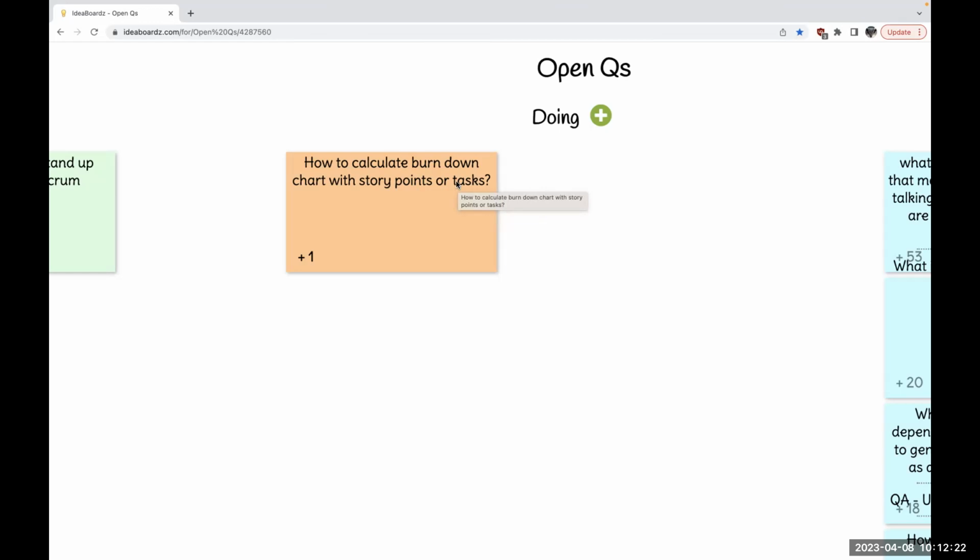But to me, as the Scrum Master of the team, I don't care where the story is in the process. What I care about is, is it in open status or in done status? Is it behind our backs, never going to look at it again, or is it something we are still worrying about? So, personal opinion, it's going to be story points. But there are some companies that will only allow you to pull the burn down chart with tasks and using hours. But the right way of doing it is story points.